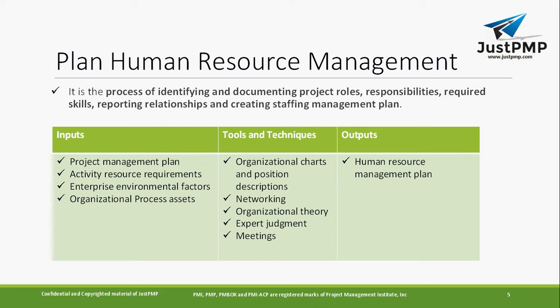The first process of this knowledge area is Plan Human Resource Management. What are you going to do? It is the process of identifying and documenting project roles, responsibilities, required skills, reporting relationships, and creating a staffing management plan. So you identify and document what the project roles are. Like you'll have a team lead, project manager, and maybe an architectural designer, and what their responsibilities will be. So you can note down those things.